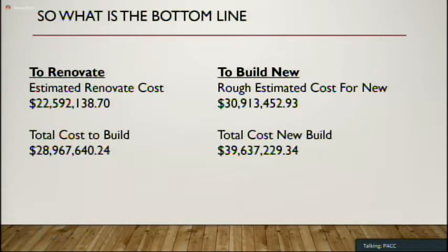So what those folks are seeing is almost a 30% increase in acceleration in costs in a very short period of time. And again, as we alluded to earlier, those costs are due to the global supply chain issues that we're having, which are impacting particularly the price of steel. We all saw and heard, either firsthand or from our friends, about the price of lumber and what happened with lumber over the past year.